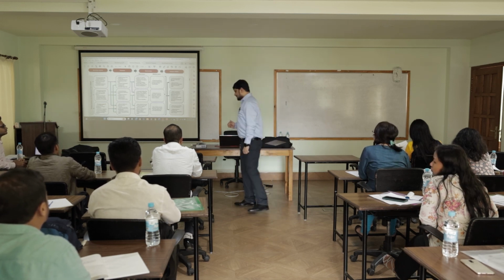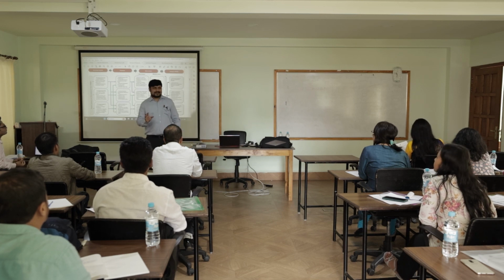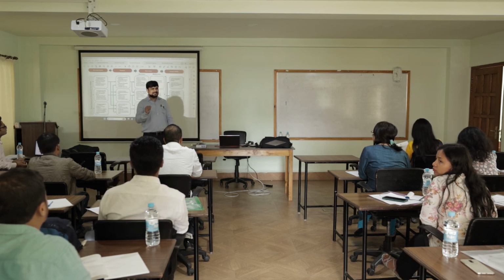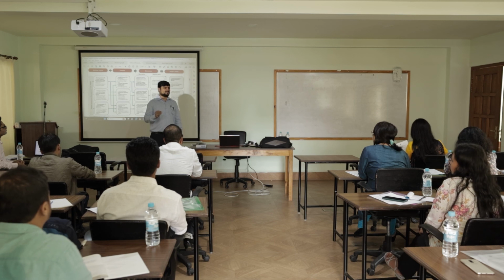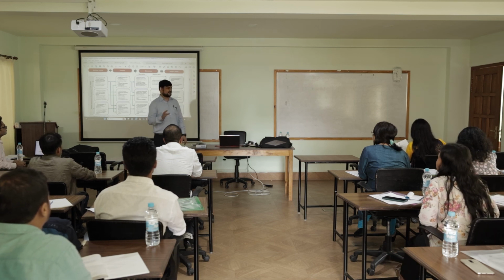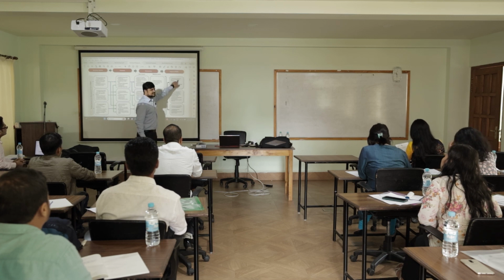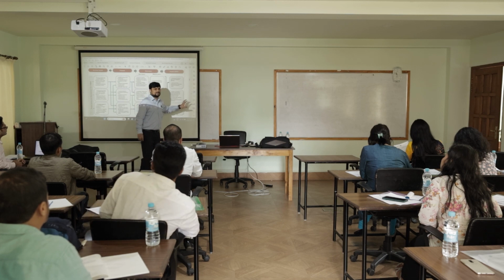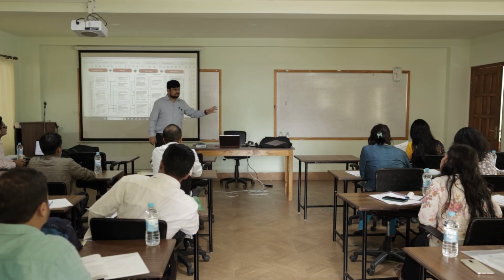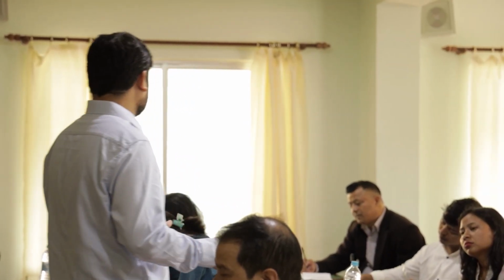For all programs, the impact level indicator is the key indicator which tells you whether the program was successful or not. We are all trying to assess whether this was attained or not, because this is what the program set out to achieve, right? And it had some targets in mind. Let's say 20% of the households should have an increased income of 18% or more, right? Now that is an indicator.